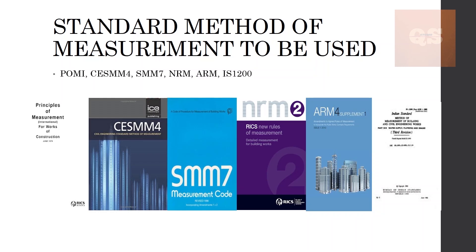When you get your documents, you also need to check under the reports or the specification or the project details whether it is mentioned what type of method of measurement is used for this project. If that is not available, again that needs to be clarified with the client and put up on the query sheet, or you can just mail them and get to know which type of measurement needs to be used for preparing this BOQ. Depending upon the type of project, type of client, the country where the project is located, the type of measurement method will also change.